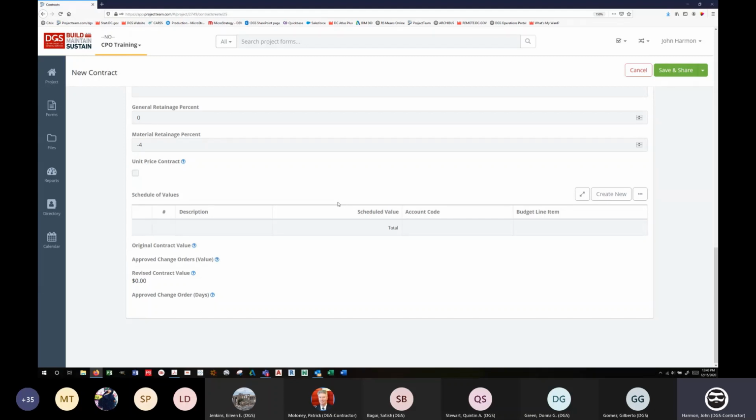In order to bill those correctly with the retainage percentages correct, you will need to split those out in your schedule of values. So you will need to put the reimbursables as a separate line. So you can create as many new lines in here as you want. Just make this match what your vendors will need to properly invoice their contract. Okay, if you have questions about how to handle something, again, reach out to us at support. We'll help you get it in there how you need it. But it's usually pretty simple. Just if they're going to need to split their schedule of values out for the invoice cover sheet to 3 lines, make sure you've got those 3 lines in here.